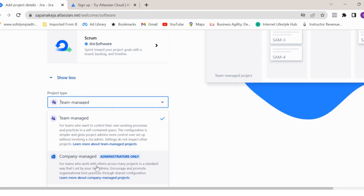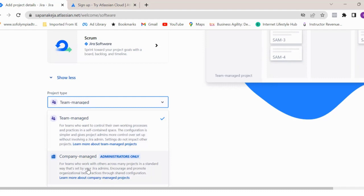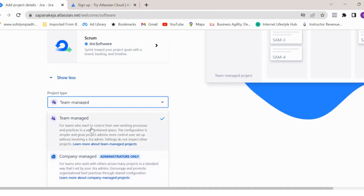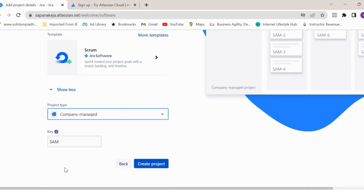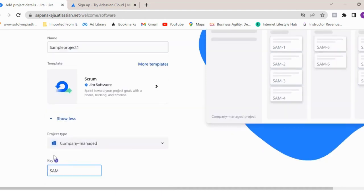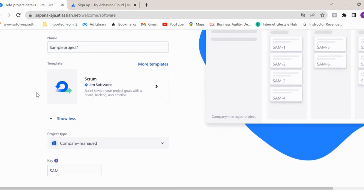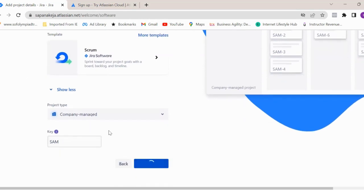You always have to select a company managed project. Why? Because company managed will give you advanced configuration and customization options. If you're creating any new issue type or new workflow for your project, you can share that customization with other projects as well. If your organization is using a Jira instance with multiple projects, company managed project is managed by Jira admin only and allows configuration sharing across multiple projects. However, with team managed project, you will not have that option and this is managed by project team management. So select company managed project. The key will be automatically generated based on your project name - it takes the first three letters and then just click on create project.